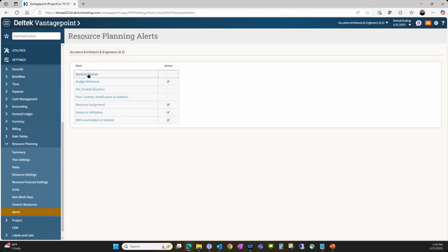You can be notified if there's a baseline change. You can be notified if there's a budget milestone. This one's a great one: getting notified when your EAC exceeds your baseline, right? So I can say right off the bat, based on my job to date and what I have left in my plan, I'm over my baseline plan. And that might be okay. Maybe we don't have an ad service yet that has hit the project that's going to flip it back the opposite way, right? You can also be notified whether there's been a plan creation, modification, or deletion.